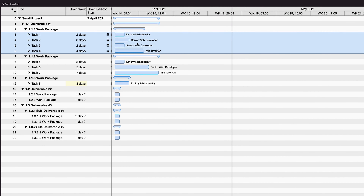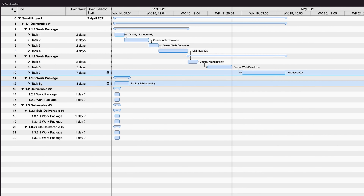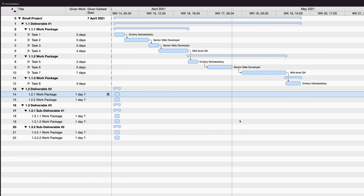Now you need to identify the dependencies between tasks. For small and medium projects, I recommend sticking to two types: hard dependencies and discretionary dependencies. Hard dependencies are dictated by the technological process or strictly required by your clients — you can't start the second task without the results of the first. For all other tasks, assign discretionary dependencies based on your vision of the project's workflow to give the project a structured sequence.